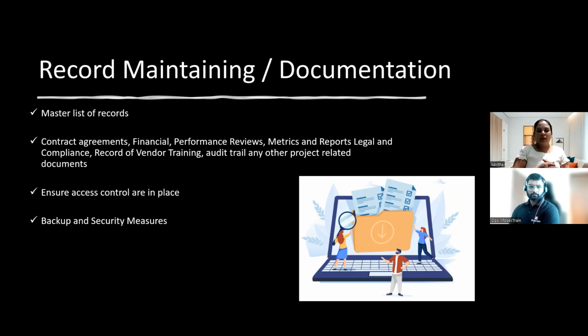Why is security and access control needed? I'm done with project A, I'm going to project B. I'm done with project B, I'm going to project C. I meet one of my friends at a party and say, hey, I was working on that project. Okay, fine, I have these documents with me, I will get them to you, don't worry. Why would a person working on project C need the documents of project A? So ensure that you remove the access of the resource who is moving out of the project.